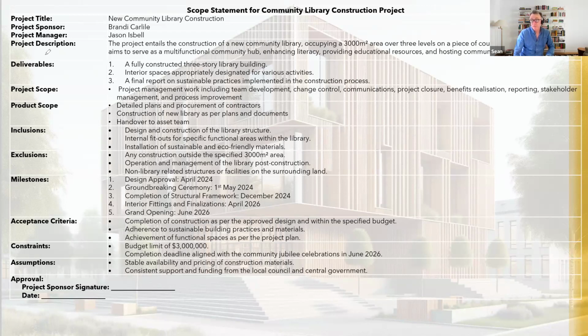So that's where we found the correct set of plans: at head office, not out on site. Whereas if they'd had clear version 1, version 2, and a clear list of the changes that had been made and within the plans identifying them, that probably wouldn't have happened. So make sure you have the correct version all the time.